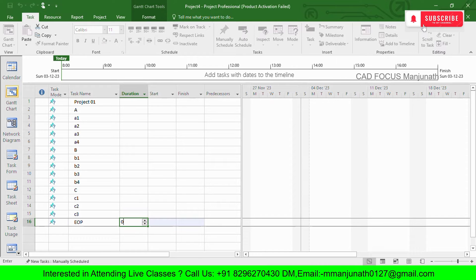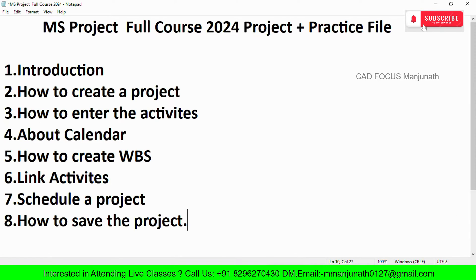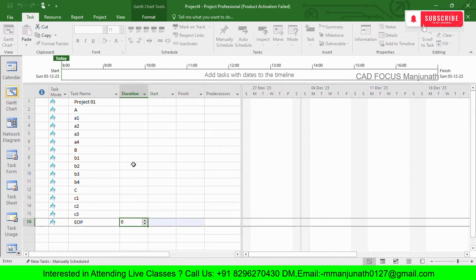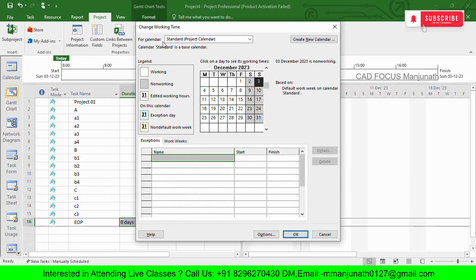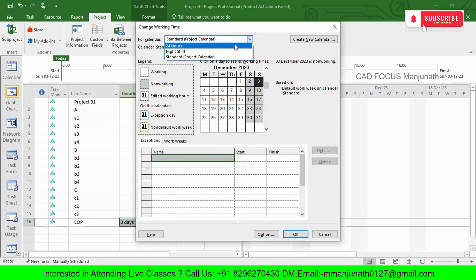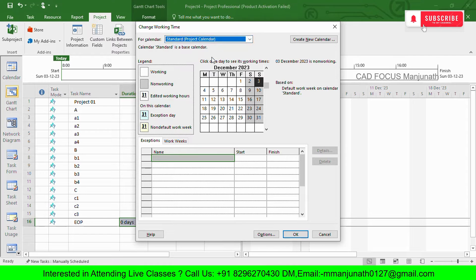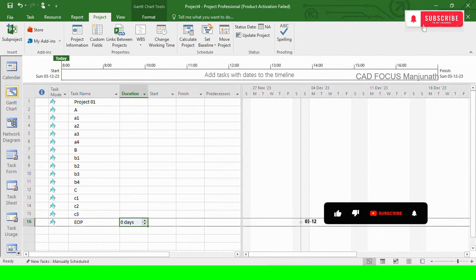Now that we've entered the activities, we need to assign a calendar for scheduling purposes. Go to the Project menu and select 'Change Working Time.' Here you can find calendar types from the dropdown: 24 Hours, Night Shift, and Standard (day shift). The Standard calendar has five working days with Saturday and Sunday off. You can also create a custom calendar using 'Create New Calendar.' Click OK.